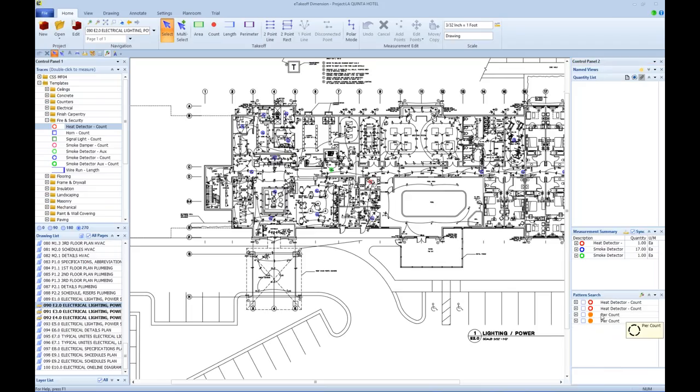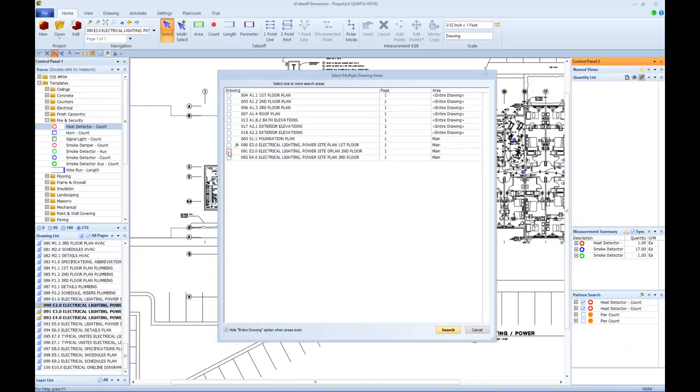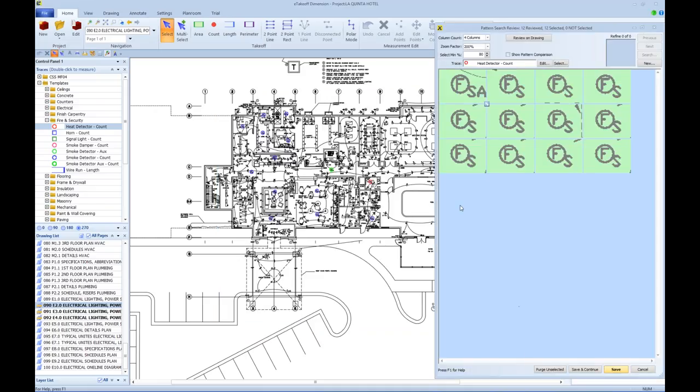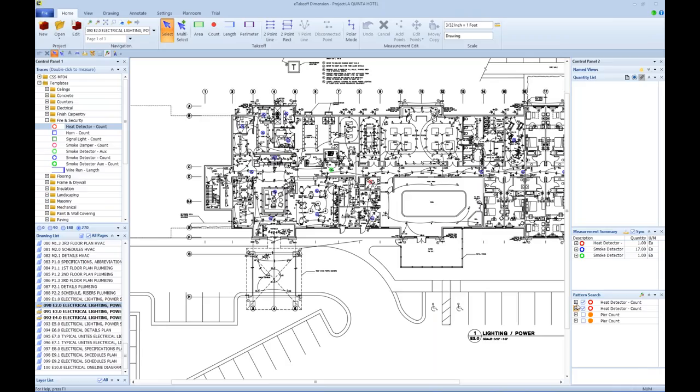You can search for piers on the concrete on the foundation plan, but I could say I want to search for these two items. I want to search on multiple drawings, and I can tell I want to search on those other two drawings that I have here, and boom, it goes off and automatically starts searching and brings up the results on the next drawing. So once I'm done, it shows my results here on the next two drawings. I can go off and go ahead and count those and review them